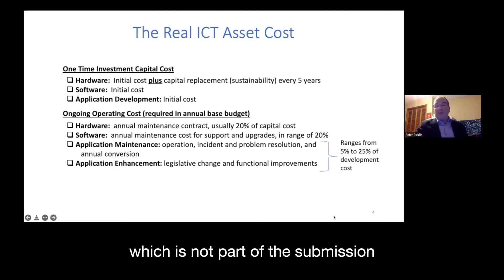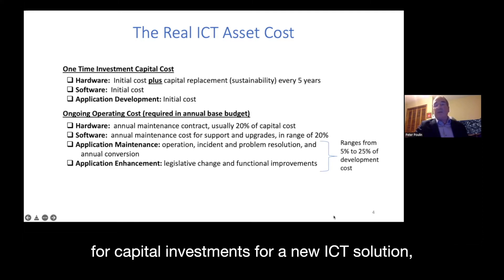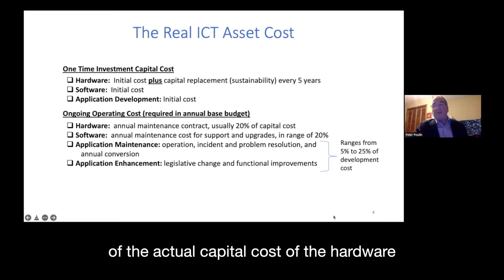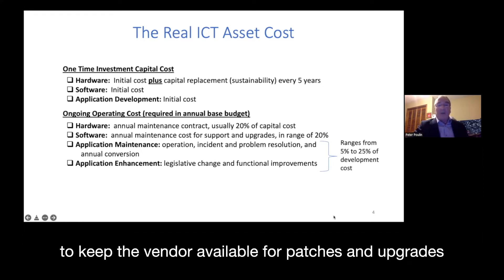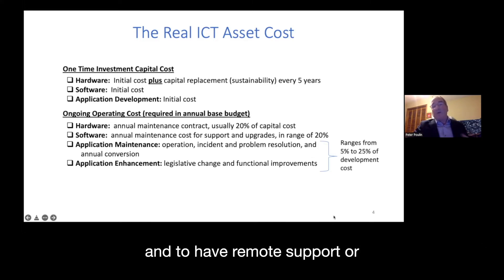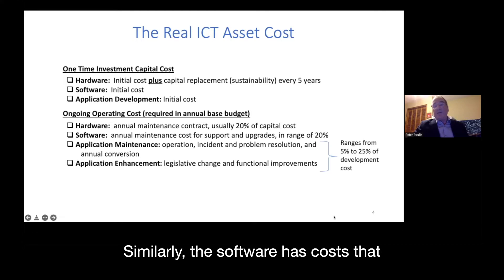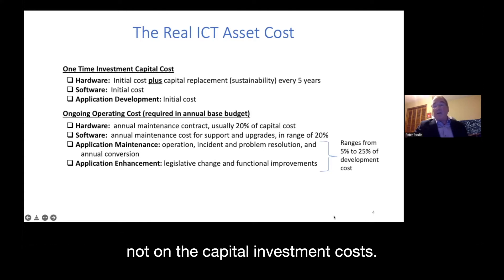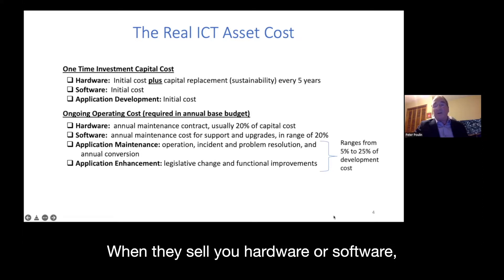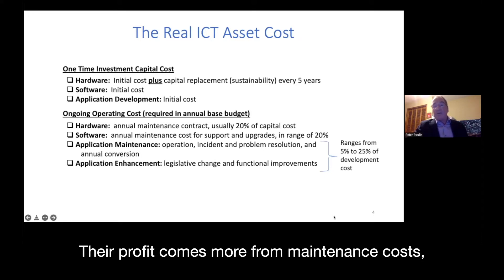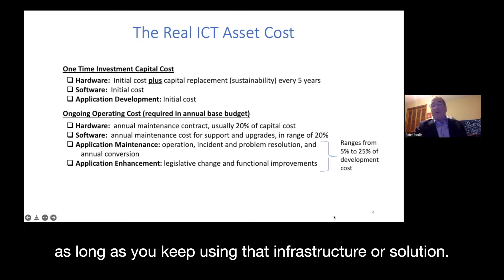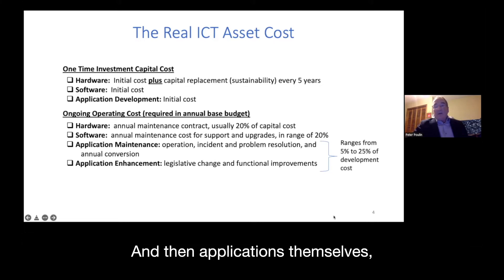On the ongoing operating cost side — which is not part of the capital investment submission — you have the annual maintenance cost for hardware, which is usually about 20% of the actual capital cost of the hardware. This keeps the vendor available for patches, upgrades, and support in times of crisis. Similarly, software has ongoing maintenance costs that run to roughly 20% of the purchase price. Vendors actually make their money on maintenance costs, not on the initial capital investment — it's almost a loss leader; their profit comes from the ongoing recurring annual costs you pay as long as you keep using that infrastructure or solution.